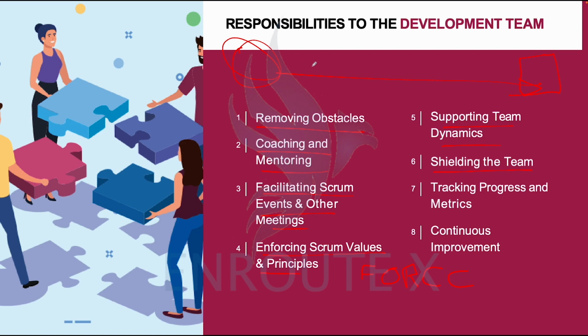I've mentioned in some of those classes that the stakeholders should always go through the product owners. All requirements are to be sent to the product owner, who prioritizes such into the product backlog, and the team now sits and deliberates on it.